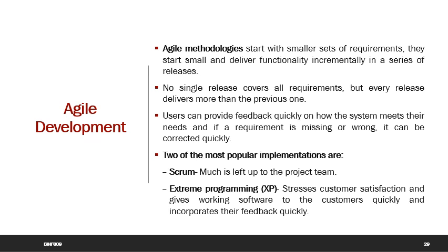With the Agile method, rather than deal with the implementation in a linear progression, the project plan is divided into sprints or short intervals, and testing occurs at the end of each interval with adjustments being made. So the key problem that Agile methodology tries to solve is changing and unclear requirements.